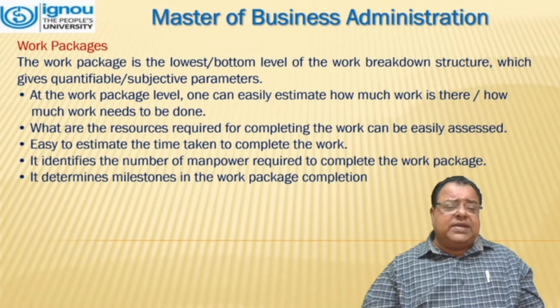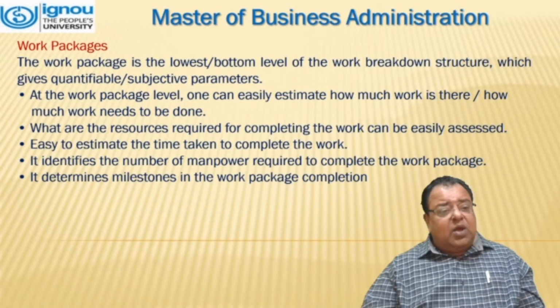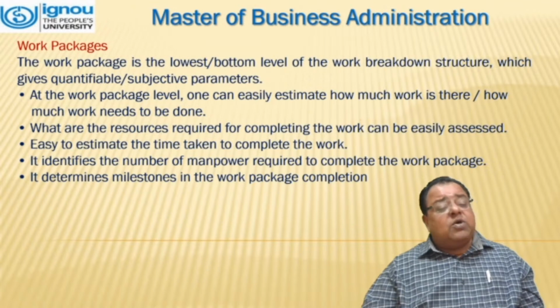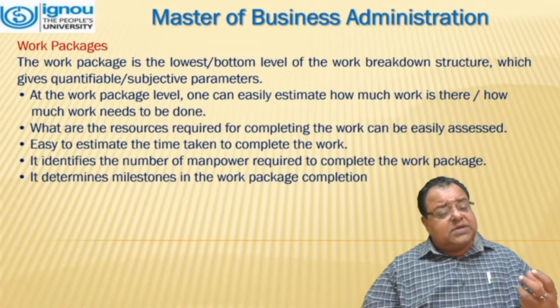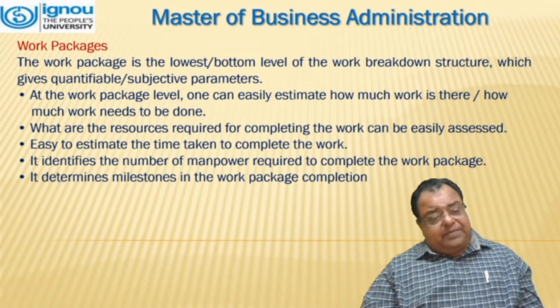Work packages. The work package is the lowest, bottom level of the work breakdown structure, which gives quantifiable subjective parameters. At the work package level, one can easily estimate how much work is there and how much work needs to be done.